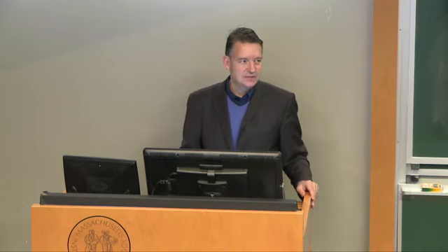Okay. So this was the test equipment itself, not the artifact you were testing that failed, but the test equipment around it. So, overload. The interesting point was that we had no control over the test equipment. It was managed by the university. So within the requirements that they gave us, the power output possible didn't match what they had. Okay, great example. So the test equipment and the test artifact need to be matched to the test conditions. So, excellent, good.